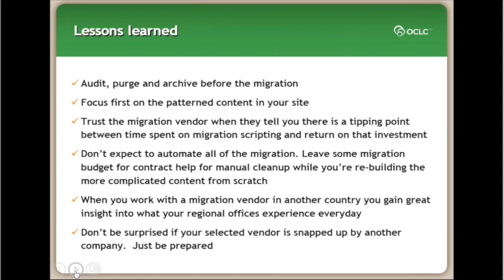Towards the end of the project, we were trying to really get granular in our scripting requirements and moving content over, when I think there was a point that it would have been better for us to rebuild some pages from scratch. Don't expect to automate everything. Make sure you leave some of that migration budget for contract help, for manual cleanup.